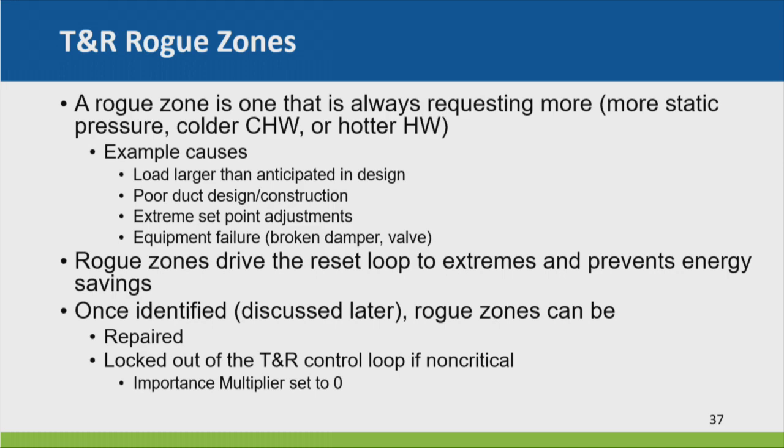I had a VAV box that crossed a rated wall, and we had a code exception that allowed me not to put a fire smoke damper in it, but the code guide on the field disagreed with my interpretation of the code, and we had to put a fire smoke damper in it. Well, it was a 6-inch duct upstream of a VAV box, so it's the little tiny duct that's going into a VAV box. And for most of you who do design work, the friction rate of a duct going into the VAV box is quite high. And when you put a 6-inch fire smoke damper in it, which is an 8-inch square fire smoke damper, it only has about a half an inch of free area because you've got the flange around the damper and everything like that. And so that poor little fire smoke damper meant that the chef whose office that was always demanded static pressure. So we had to fix it in the field.